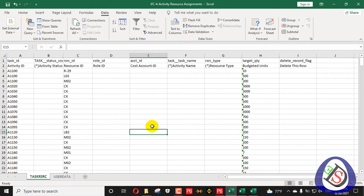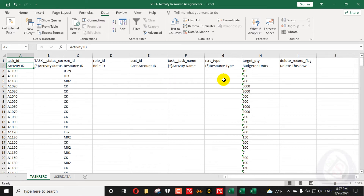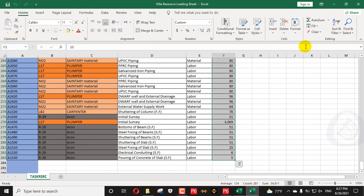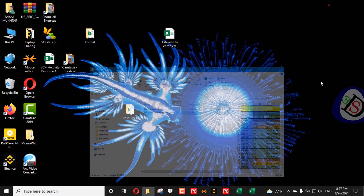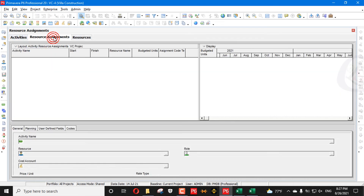You don't need to update any other fields — Activity Name will be retrieved automatically from the Activity ID. Some people also update resource type or other columns, but that is not necessary. I will just save and close that file, then go back to Primavera P6.